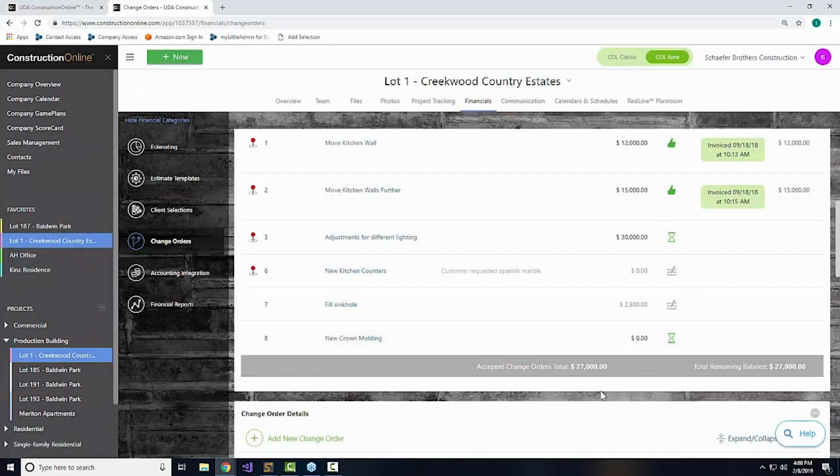But most importantly, again, all of it is documented, all of it is available, and no longer can the customer say, well, we didn't actually agree upon a price for that, so the price is nothing. No. In this case, all of it's documented, locked in, and approved when they do it. And until they say, yes, thumbs up, let's move forward, we're not committing to anything.